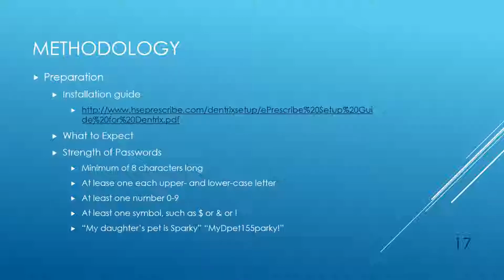In reality, the actual time spent in front of the computer was easily 4 to 5 times the Dentrix estimate of 2.5 hours. A lot of time had to be spent contemplating the impact of changes to the business that required explanation in non-technical terms to the dentist and business manager as they performed their day-to-day duties in what was clearly a bit of a hectic environment. That took time, a lot in some cases, but was absolutely necessary.